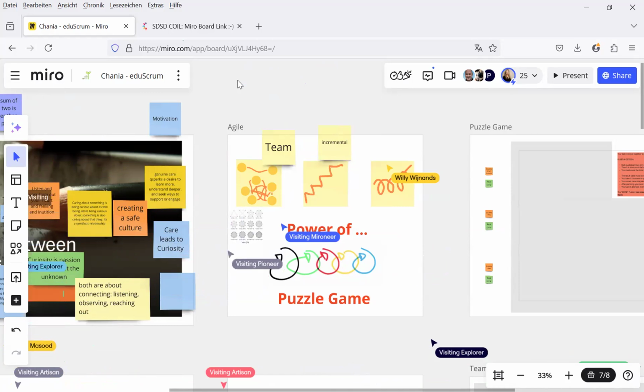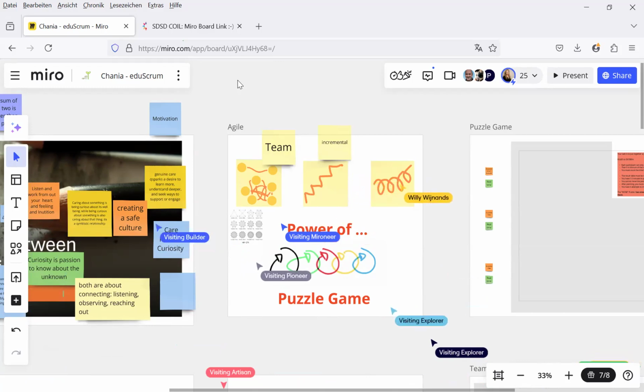Imagine we would have maybe the product of a to-do app, so we would like to organize our to-dos together in a team so that we can check them and enter new to-dos. And incremental development would mean that after 2 weeks, the development team would deliver already something I can have on my phone.